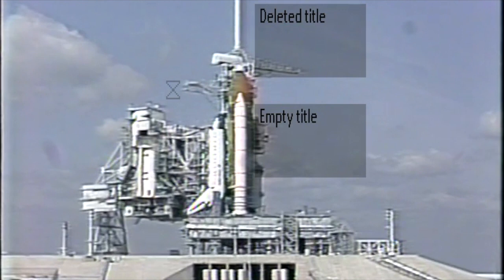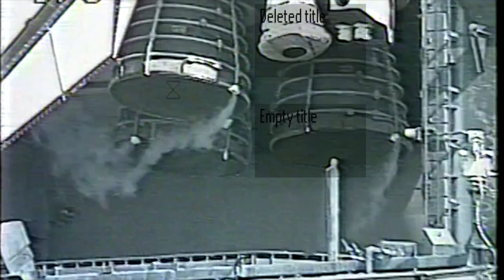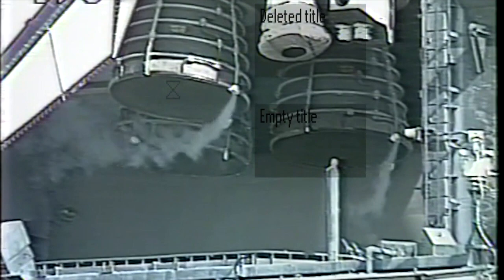About 10 minutes after the cutoff of the engines, the external tank will be emptied of its liquid hydrogen and liquid oxygen. Also, those propellants will be returned to their storage tanks at the launch pad for reuse at launch. After engine shutdown, initial safing and propellant drain back, the gaseous hydrogen injection test of the aft compartment is scheduled approximately 1.5 hours after the FRF. This 4-hour test will assess the hazardous gas mixing and emergency purge effectivity in the aft compartment.